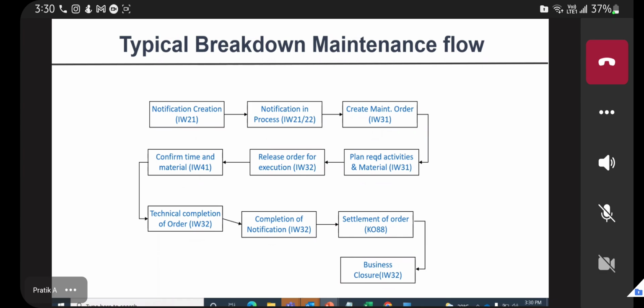So basically, this variance is also important because if I have a variance in my planning and actuals, which means my planning was not done correctly, right? But if I go ahead and add it on my order directly and I don't see any variance in my plan and actual, then it's not correct, I think.